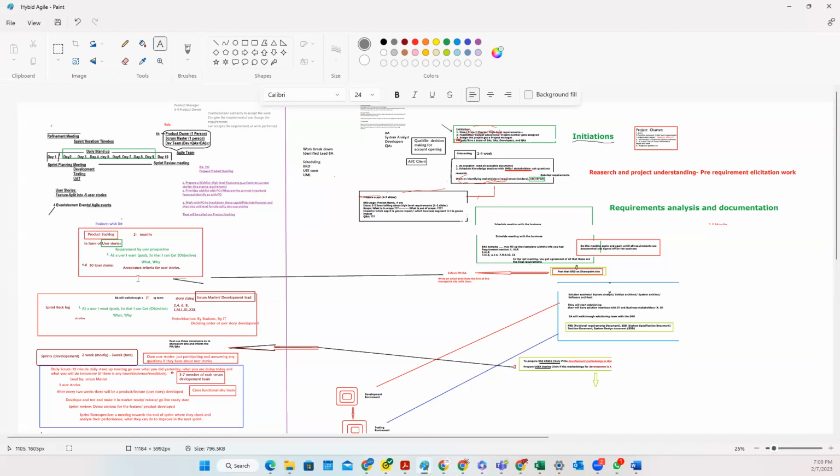As you are documenting the acceptance criteria, it will show whether it is a smaller item or a high-level thing. If the acceptance criteria contain multiple things that are not related to each other, then you can ask the question, hey, I feel like this is a more high-level requirement. Can we break it down, so that the same kind of items would be in one story, based on the similarities or differences? That's how you break down the user stories with the product owner and keep building the backlog.